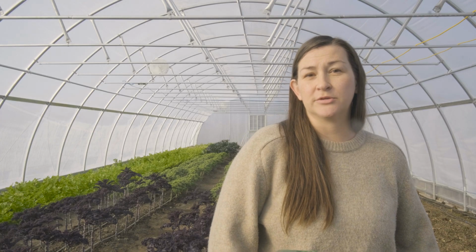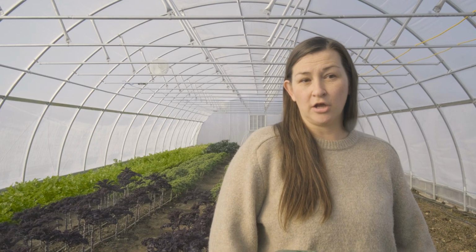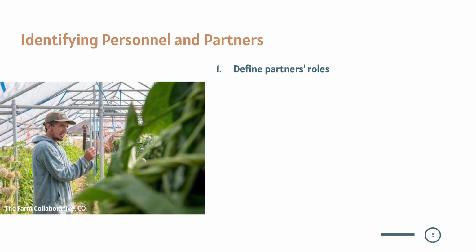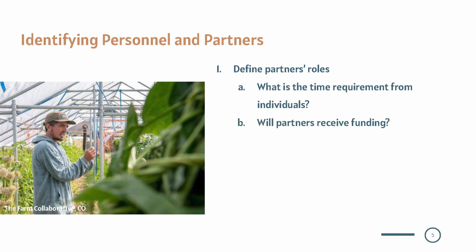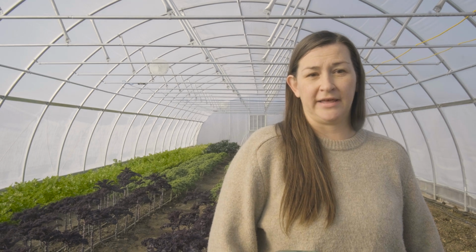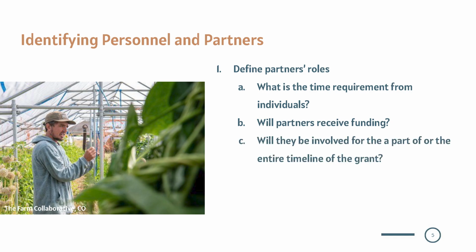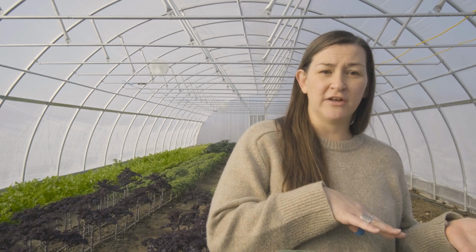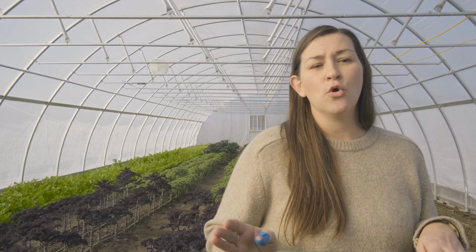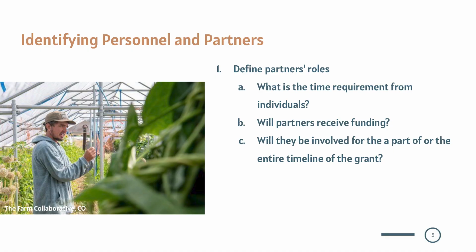These key people make your project more feasible, extend the impact of your work, and also integrate it into the broader food system. As you define staff roles, it can be really helpful to consider how much time a task will require and how much it will cost to pay someone to do that work. I frequently start roughing out a very early draft of my budget at the same time as my work plan. This helps me understand how much help and staff I can actually afford, or where I might need to adjust grant activities to best match the budget. As you'll learn, work plans and budgets are an iterative process where you go back and forth making sure the activities match the funding request and the funding request matches the activities. We'll cover the budget in more depth in the next module, Module 4.